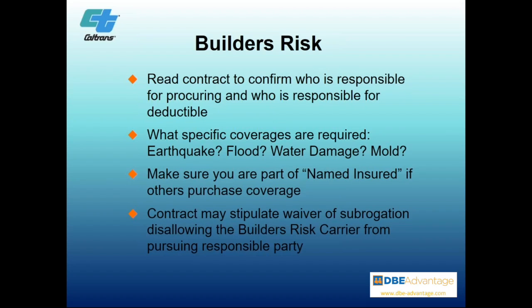If you're working on a site for a client and somebody breaks in, matter of fact, I think I had this as a question one time, somebody breaks through the fence and begins to do damage on the property, both to your project and equipment, but also to others. The question is, who covers that? Well, there could be a whole subrogation of whose responsibility that is in your contract. So make sure you understand your contract and that you're up to speed as to what, in fact, is the order of preference.